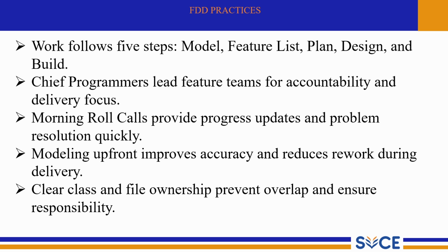And the last one is clear class and file ownership, which prevents overlap and ensures responsibility. In FDD, each class or file is owned by a specific developer. This prevents duplicate work or conflicts, and it also makes it clear who is responsible if an issue arises. Ownership leads to higher accountability and quality.